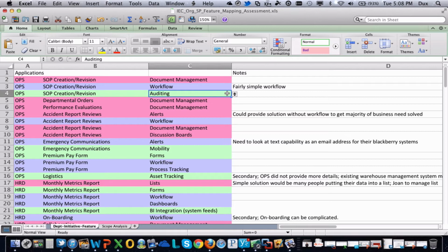But I want to make sure that as they're describing, just like what Miss Sally told me, I can say you need this, you need that, you need the other thing. And at least initially, what I look at is just out-of-the-box stuff. That's the rule of thumb. On your first pass, when you build your requirement solutions, you look at out of the box until you're very certain you cannot do it out of the box. Once you're certain you can't, the next thing is you look at third-party products. Custom code is the last resort. Y'all with me? And you all know for a lot of different reasons why that is.